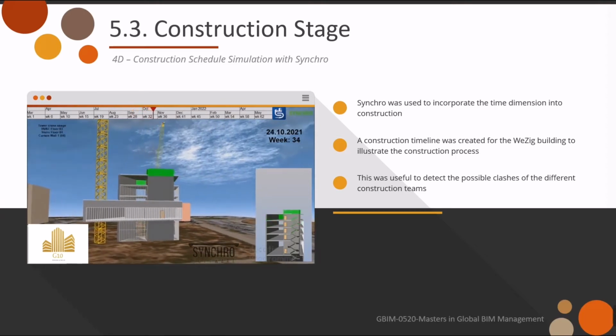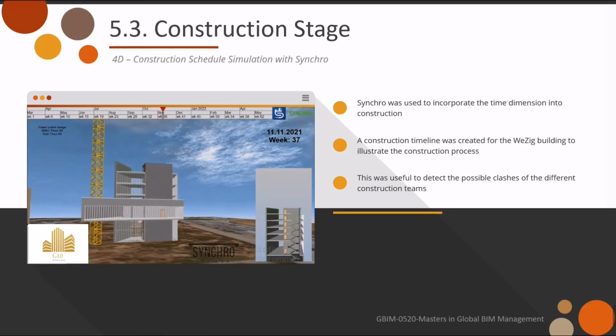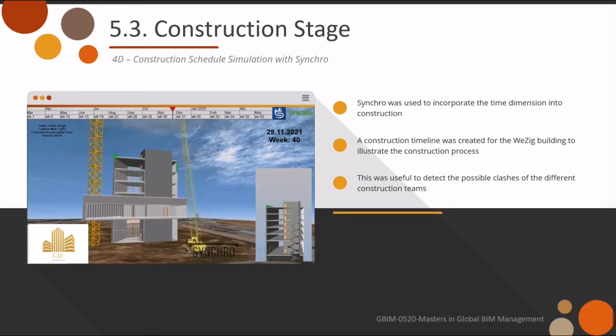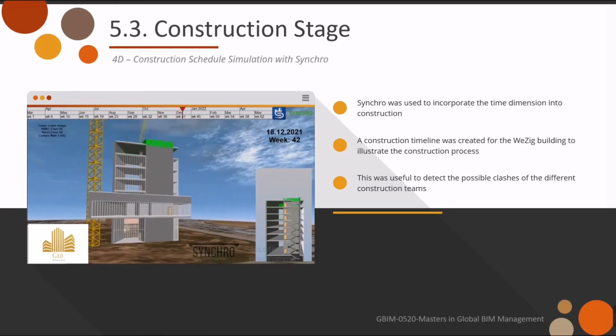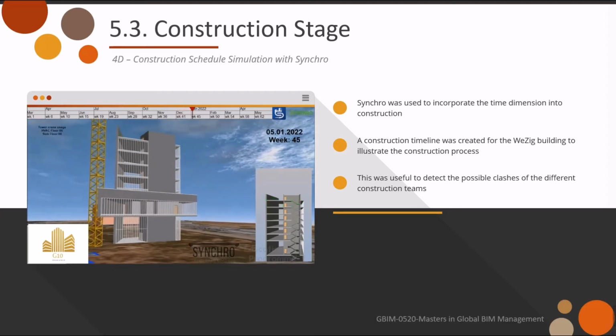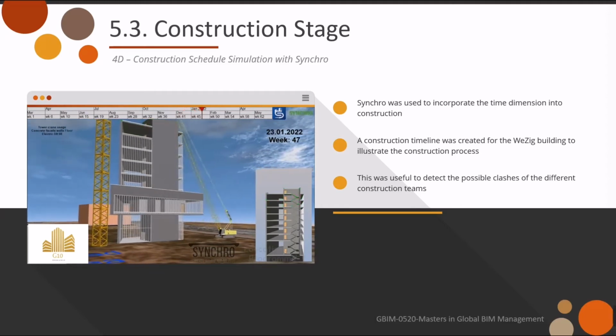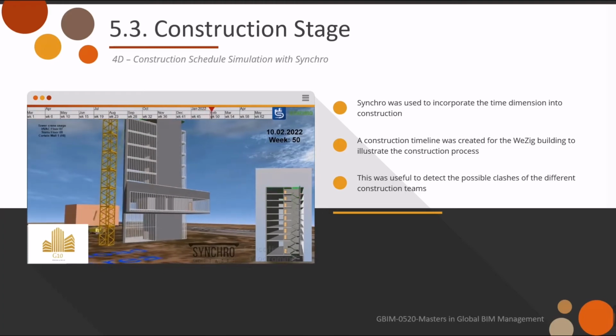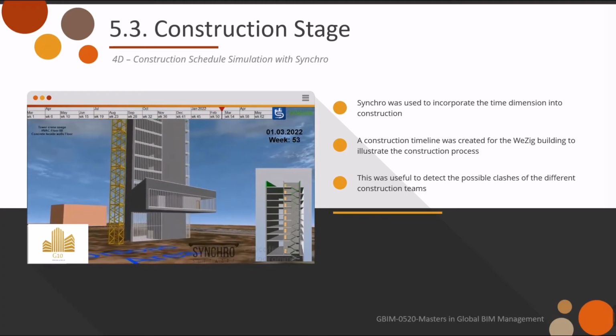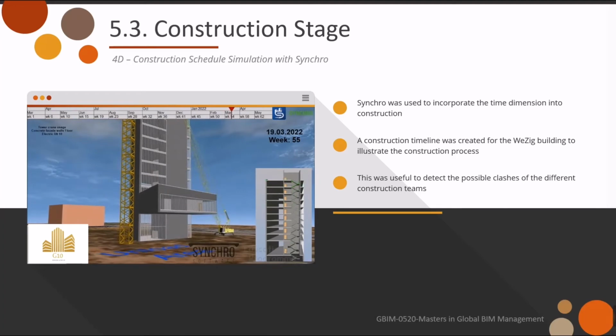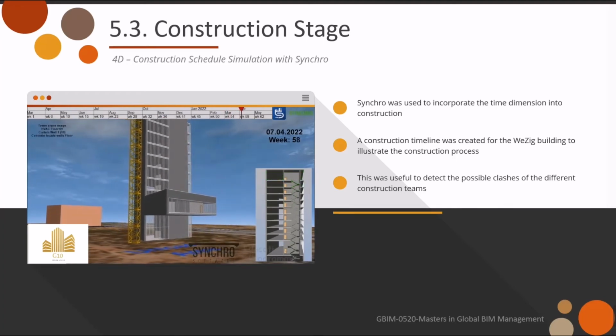This process is not only limited to the actual facility. One can easily simulate the movement of the cranes and different equipment. It is also possible to visualize the delivery of materials as well as the removal of construction waste. This is an advantage, for example, for projects which do not have much space and need to maximize the efficiency of the area they have.